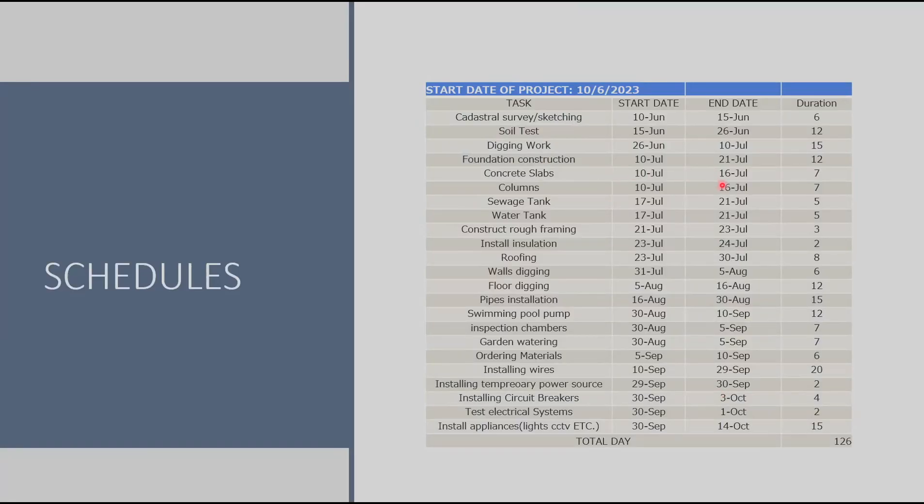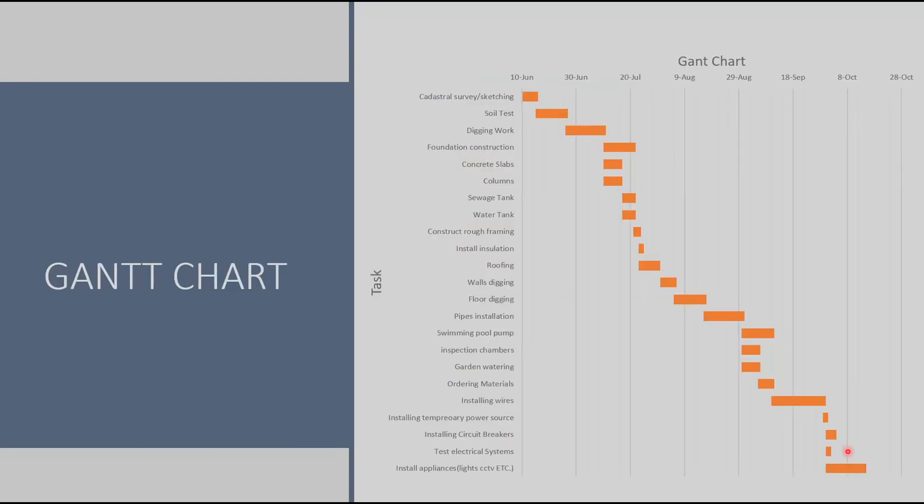Finally we have the project timeline divided into sub-stages and the whole project duration is estimated to be 126 days. And we have also the Gantt chart which shows which tasks can be done parallel with other tasks and which tasks need to be done before starting the next task.